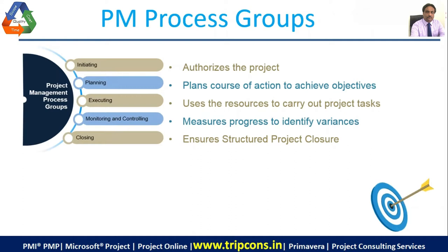And then we come to the closing, which ensures structured project closure. So we wrap up all our project area, we clean up the project place, we give training to the end user, we hand it over to the production or the operations. Okay, and we do our closing documentations. We write invoices to get the final milestone payment, and we make closing payments to all vendors.